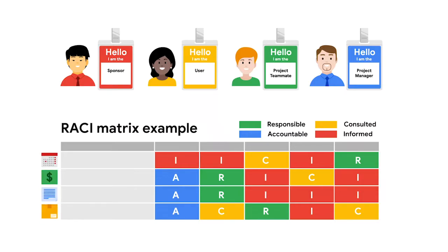Let's discuss tools and techniques you can use to identify risks, including brainstorming and risk assessment. Brainstorming is one of the most effective techniques for identifying risks with a team because it allows groups to spontaneously share ideas without judgment. As a project manager, you will be responsible for bringing a group of people together to imagine potential risks.